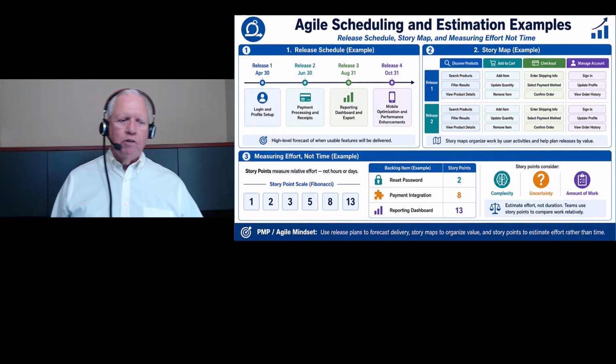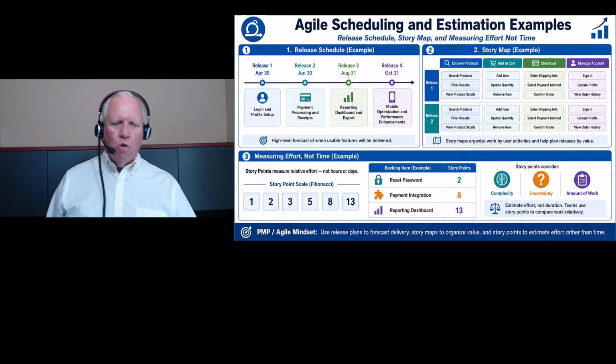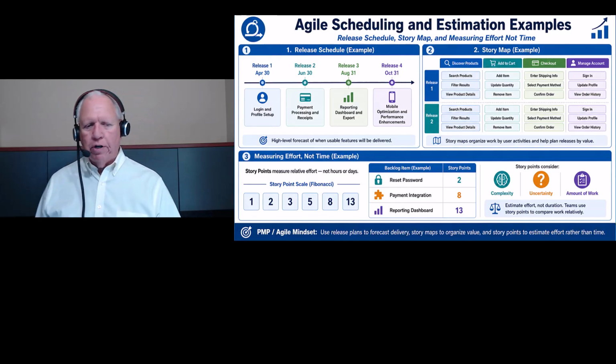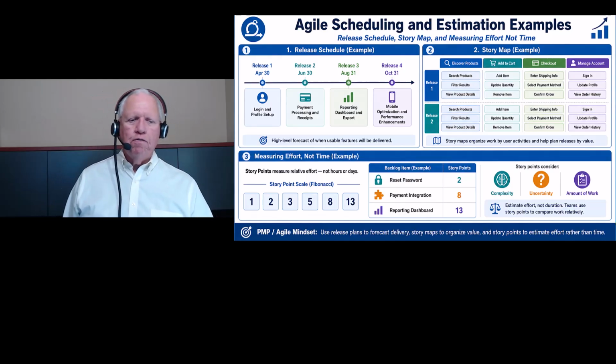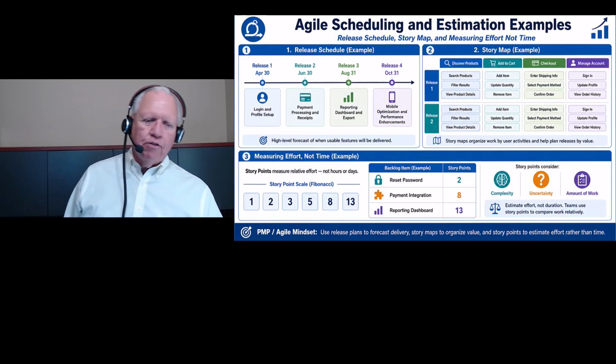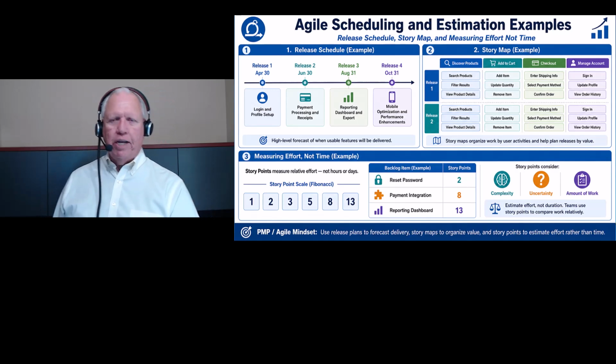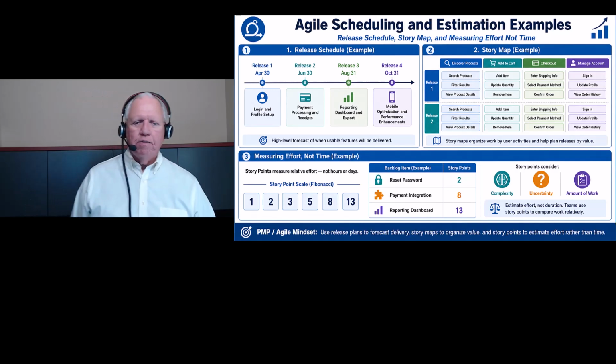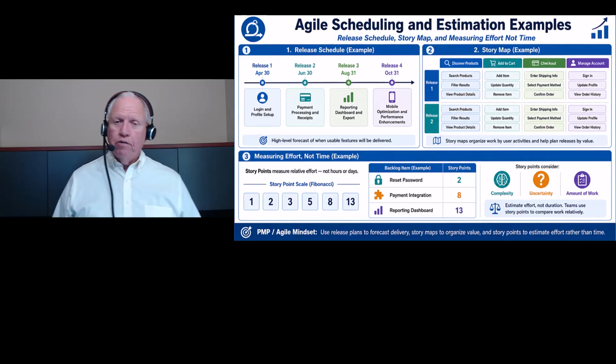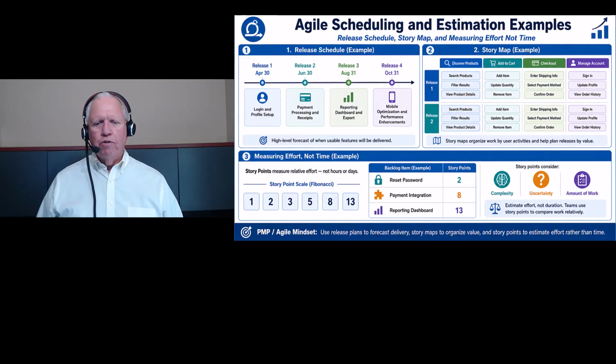And so what you'll notice here is 1, 2, and then 2 and 1, if you add those together, gives you 3. And then 3 and 2 gives you 5. And then if you add 5 and 3 together, it gives you 8. And then if you add 8 and 5 together, it gives you 13. That's how you're going to calculate the Fibonacci. And sometimes they'll ask you about what the next score is. Very simple once you've heard it, but it'll throw you off.